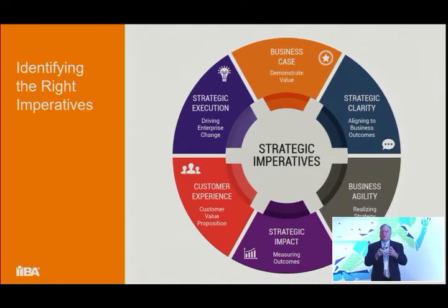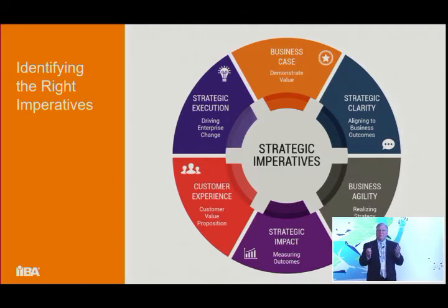So I've spoken to a number of companies around the world that are intentionally slowing down the outcome, because when they were going fast and doing monthly releases, their customers couldn't adapt that fast. So they've slowed that down to rates that are more acceptable to the customers in terms of the rate of change.